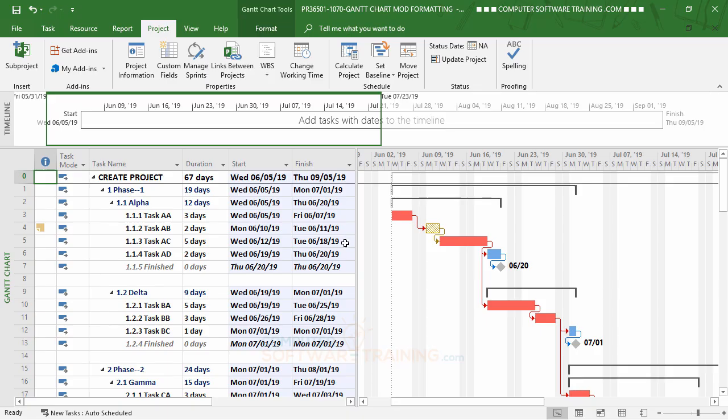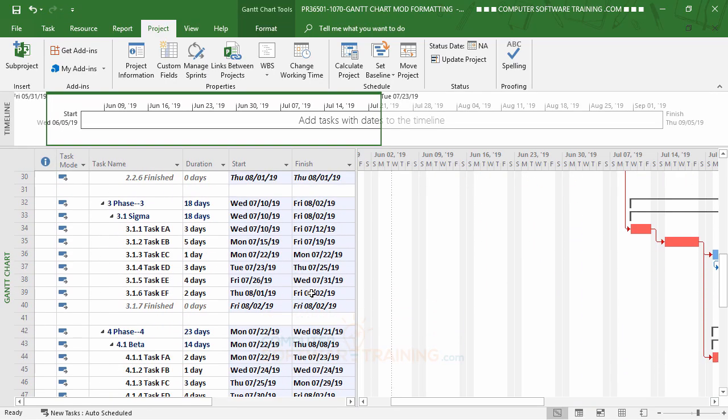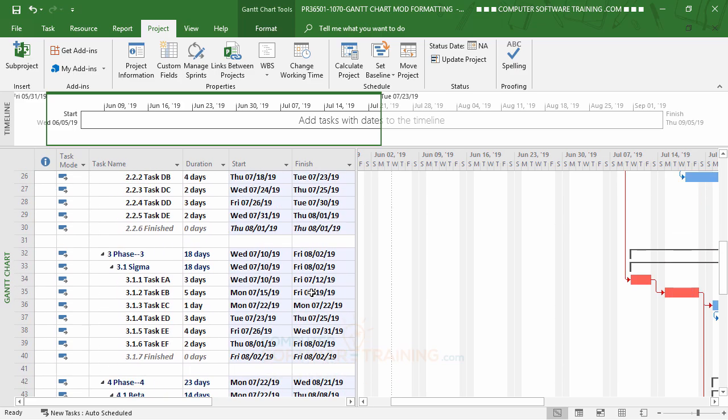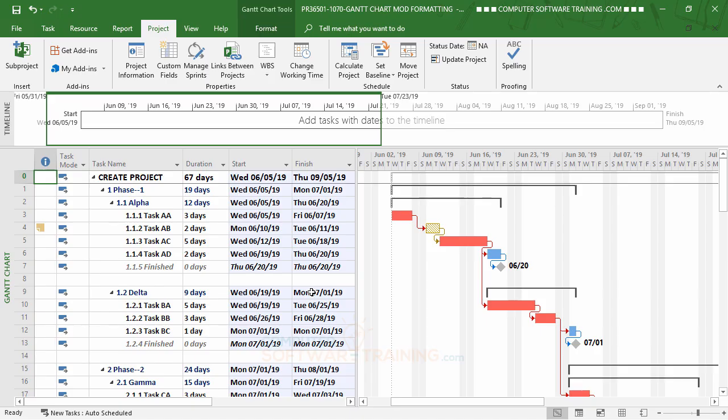You can tell that everything changed because that light blue highlighting lets you know that all of this has changed. Every date in there is now changed. Why? Because we changed the start date. So the project will start on June 5th, and because we've got this project summary up here, we can see that it ends on 9/5.